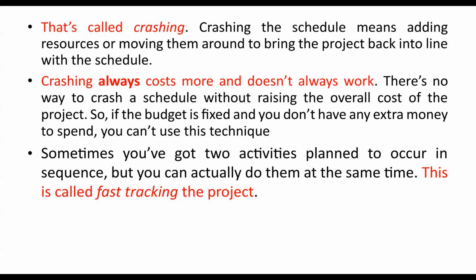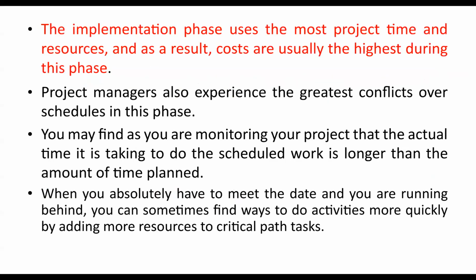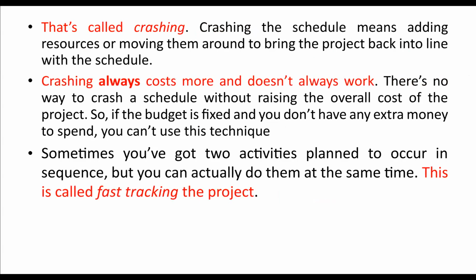Now, what is a critical path? It is very, very important for you to understand that we also have to consider the critical path. Now, what is crashing? Crashing the schedule means adding resources or moving them around to bring the project back into line with the schedule. Crashing always costs more and it doesn't always work. There is no way to crash a schedule without raising the overall cost of the project.